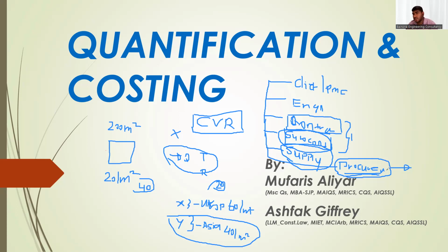Now, as a cost controller, you do a cost value reconciliation. Reconciliation is an English term; we know what it is. You do some analysis, some reverse and forward calculation. That is a kind of reconciliation. In the example here, the cost is 20 dirham. Let's talk about company X. Their value is 60, so their overhead, profit and brand is 40.